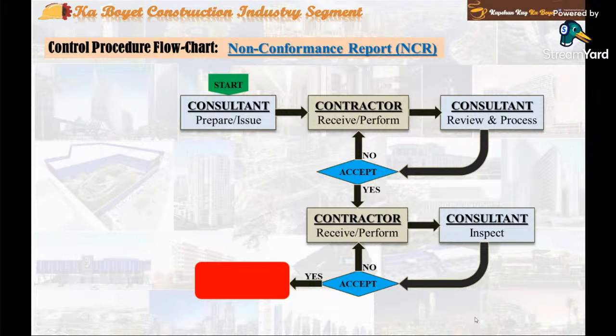Updated NCR log registry. The consultant shall issue a weekly updated summary of NCR to the owner, architect, engineer, designer, QS, consultant, and the contractor during the weekly meeting. The output is a weekly updated NCR summary report.